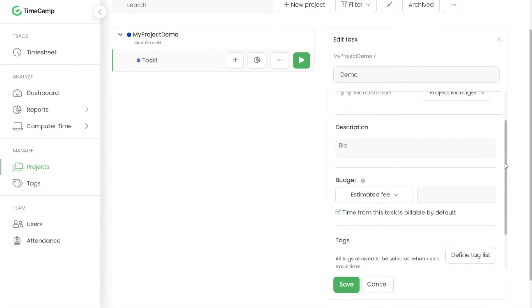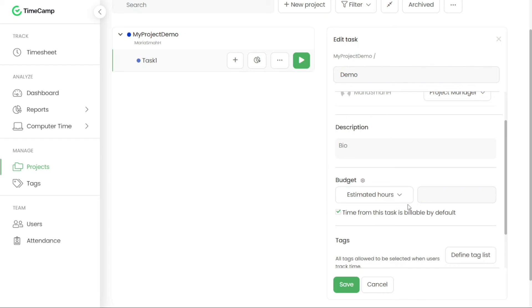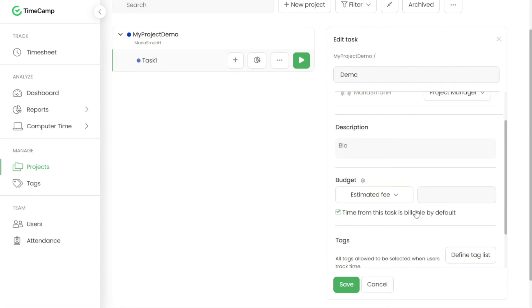Setting a budget for a task is another useful feature in TimeCamp. By assigning an estimated fee or estimated hours to a task, you can track and monitor progress against the allocated budget. This feature is particularly helpful for managing project costs and ensuring efficient resource allocation.